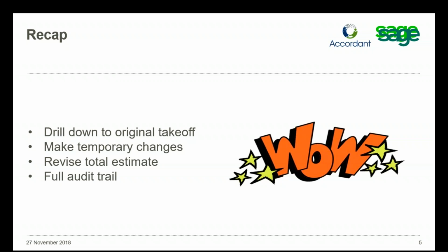a change order could be something that's changed in the spec, or where we actually did the change over in the drawing, and I could call that a change order. Or I could actually create a new group of items and call it a change order, and separate the rest of them into regular items. So let me see, what would be the best way to do this? There's a variety of ways we can do that. Sometimes I can do a change order as a separate estimate too, just so you know. A lot of times I may want to keep that separate, and then I want to merge it into my other estimate.